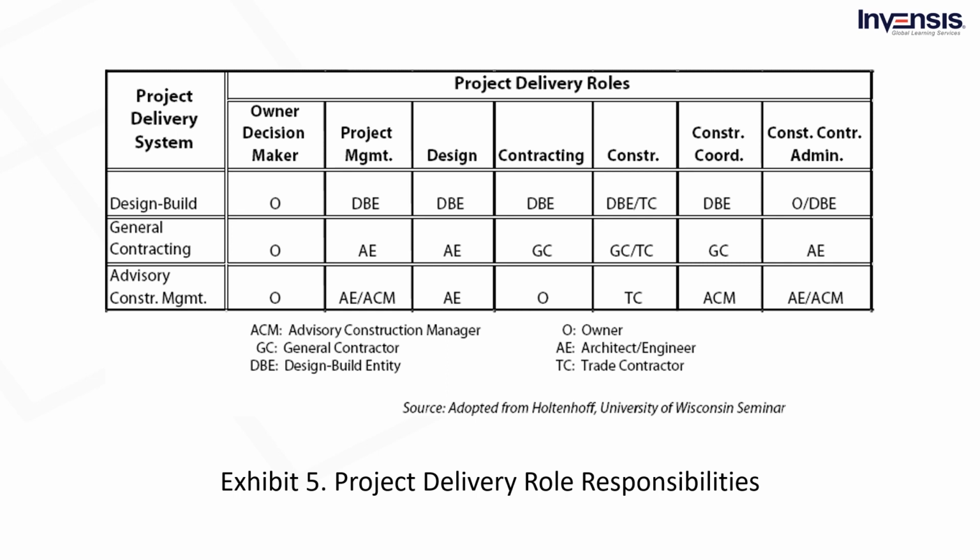One of the most typical project delivery failures is in the project management function, particularly general contracting and advisory construction management delivery systems. The designer frequently handles the design services in the general contracting system but ignores the overall project management. This does not imply that the designer should control the actual construction process, but rather the design and construction related to the effective completion of the project.